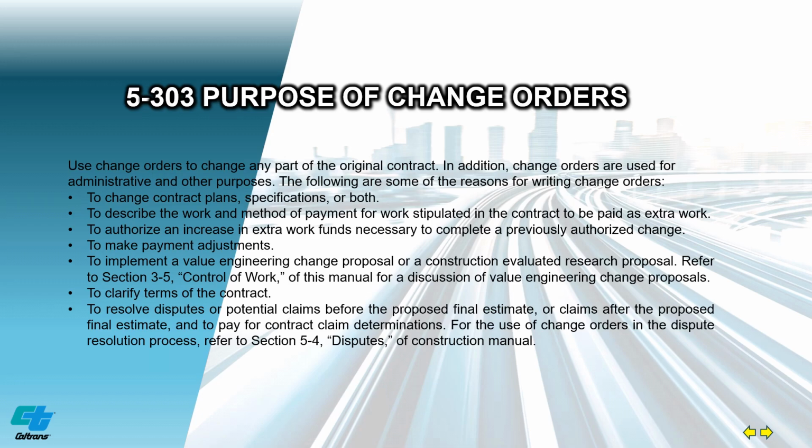What is the purpose of change orders? Use change orders to change any part of the original contract. In addition, change orders are used for administrative and other purposes. The following are some of the reasons for writing change orders: to change contract plans, specifications, or both. To describe the work and method of payment for work stipulated for the contract to be paid as extra work.